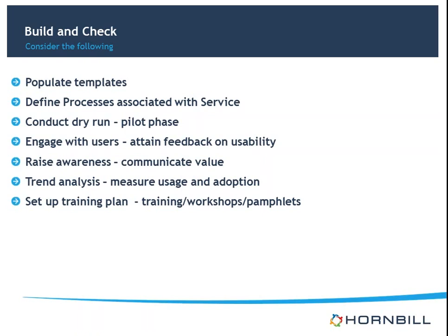In this phase, it is necessary to test and monitor the service catalogue on a regular basis for reporting purposes. This can be presented to a small team of testers or to a department, otherwise known as beta testers. It is worthwhile to engage with these users to obtain feedback on the usability. Also, during the pilot stage, the beta users can be monitored by the service catalogue team to measure usage and adoption rates.